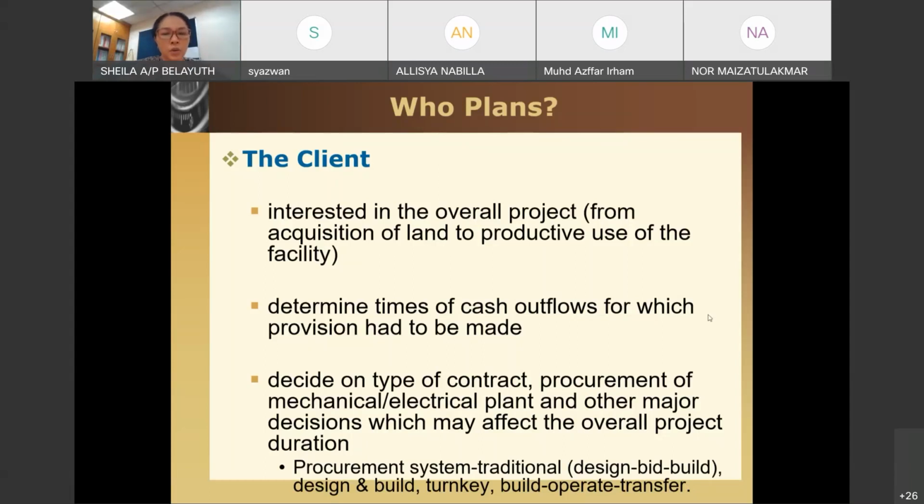Okay, so if you can see, the way I describe this is different than type of contract. So type of contract, I will see how do you sign off the contract dengan contractor tu. Okay, so do you pay them lump sum? So for example, lump sum is where the contractor will say, okay, these are the activities that is needed, or the whole thing, okay, it costs you 1 million. Lump sum, macam tu je, 1 million provided. So that is how you sign the contract.